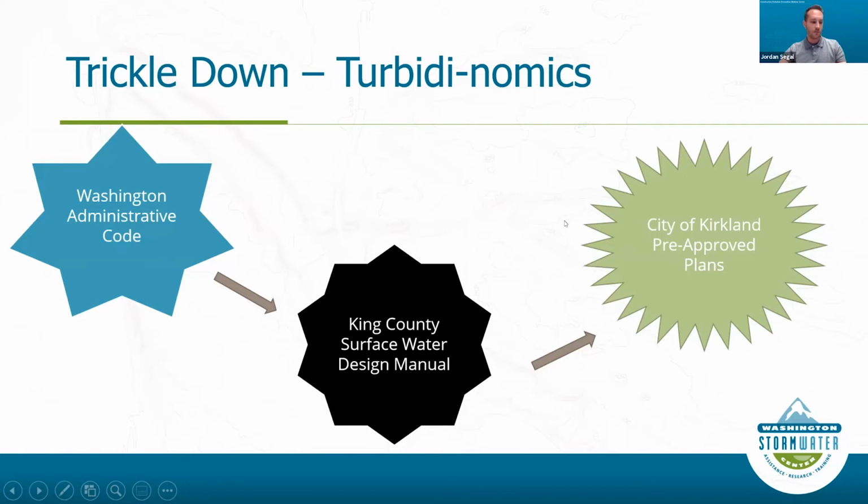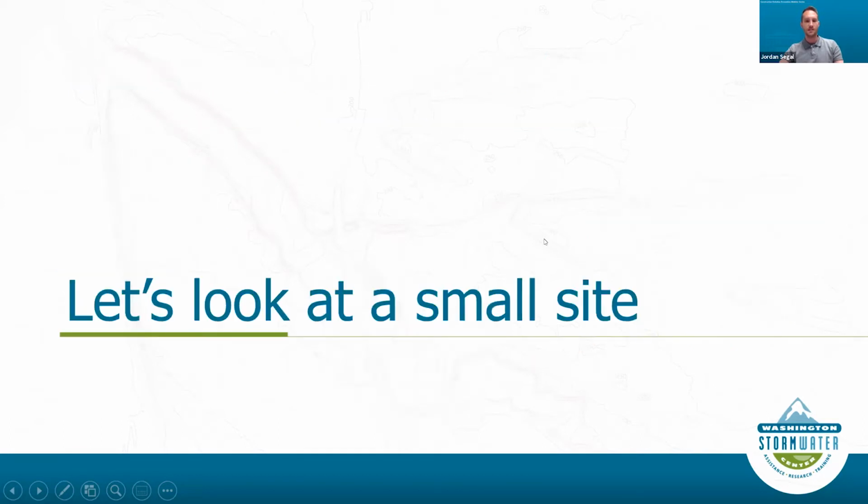Whatever the particular phrase may be, you should go and consider all of those and understand that if it's not in that specific local level, for instance, if it's not in the city, it's not covered, then you back up and you go to the county and you consider what they have. And if for whatever reason, it's not in the county or a higher district, you go to the state. And that's where you'll find information related to what your project site will need.